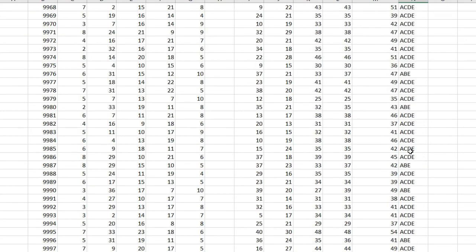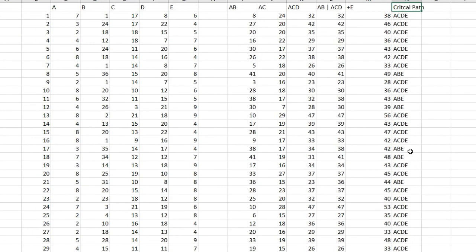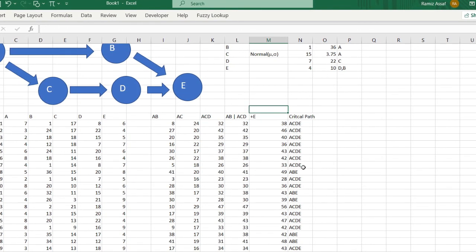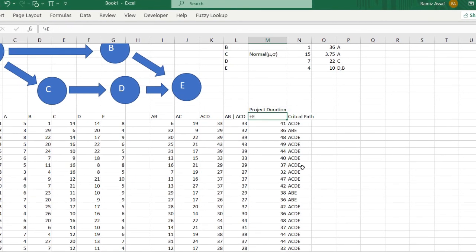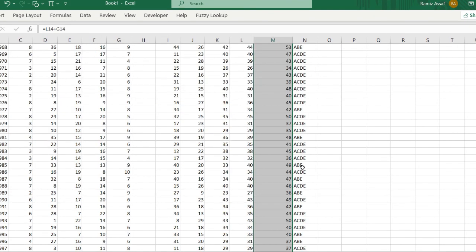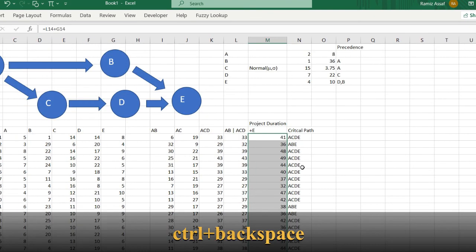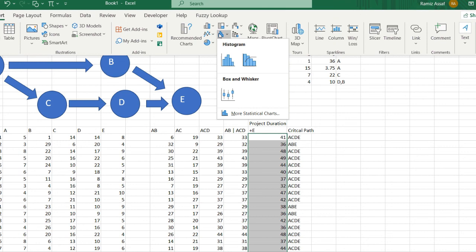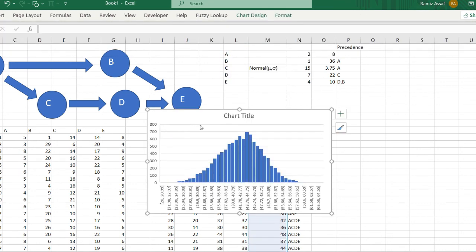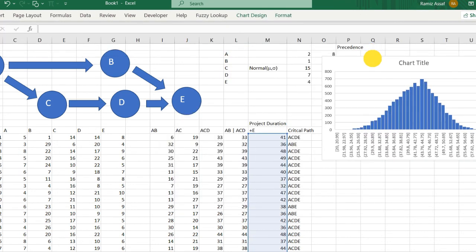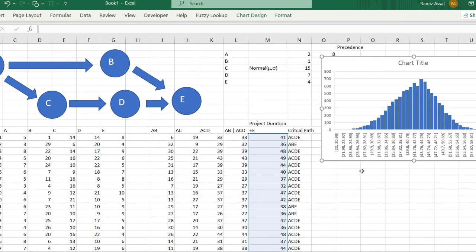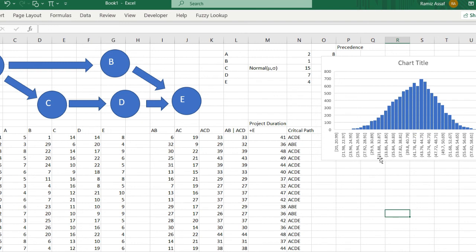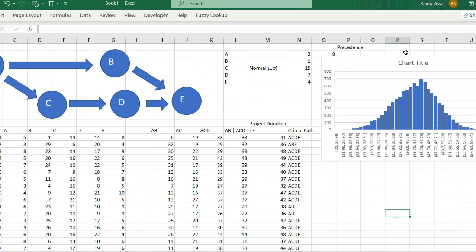And what's the interesting part—this is the project duration—and I can do something like a histogram. So insert histogram. As you can see, somehow it looks like a normal distribution. And you can ask questions and answer them. So what is the probability of me finishing the project within, I don't know, 31 days or before 31 days? So this is 31 days somewhere here, which is not more than 10-15 percent.